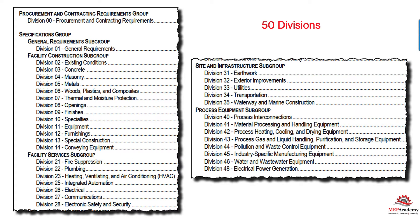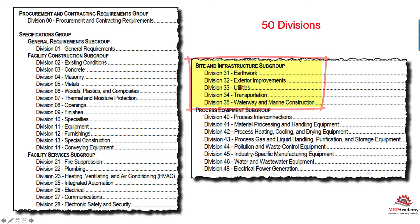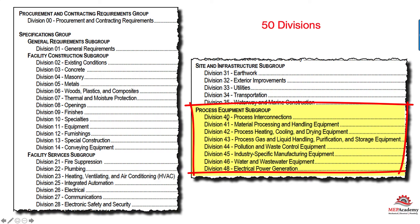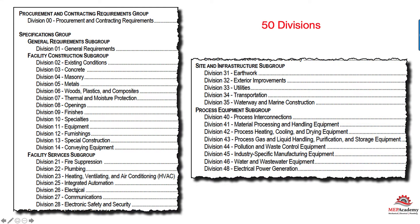If you do additional work, you may do Site Work, which would be in Divisions 31 to 35. Or if you do Process Work, Divisions 40 to 48, which covers Process Heating, Cooling, and Drying equipment, or Water and Wastewater equipment. Depending on what your plumbing, HVAC, or electrical company does, you'll have other divisions. But your main MEP categories are Division 22, 23, and 26.